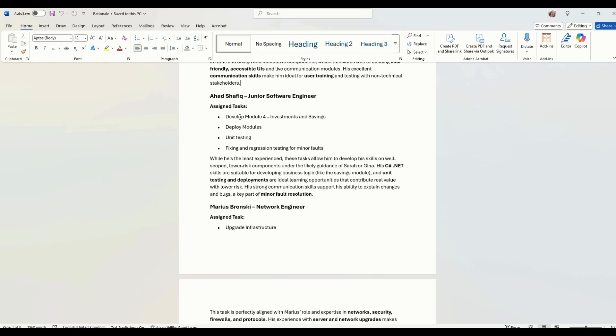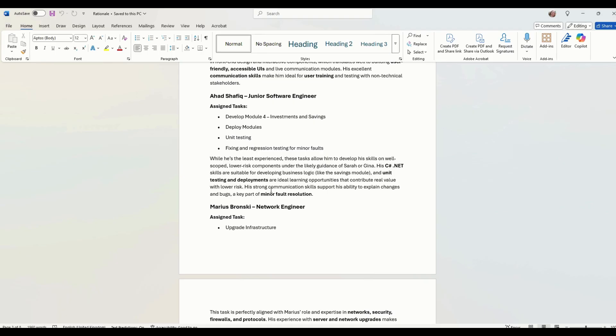We've got Arhad. He's doing all of those things. He's the least experienced because we want to allow him to develop skills. So we're going to give him the lower risk components. He might be guided by Sarah or Gina. So we might want to go back and put Sarah in to our plan. So where we've got Arhad on task, we might also want to assign Sarah to that, but bearing in mind that that will increase our project costs. So we're not actually going to put that in at the moment.